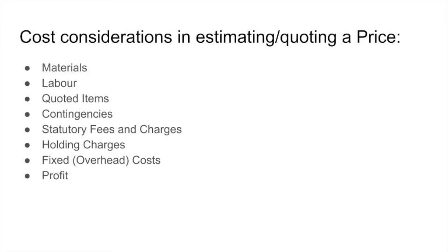The other side of the coin looks at fixed costs. Now you have to consider, what are my fixed costs? So as I say, if you've got ladders, or scaffolds, or all those things that are required in order to do the job you do, those would all be considered fixed costs because you can use those over multiple projects. Every situation will be different, but you have to figure out what costs are variable, the materials, the labor, contingencies, these sorts of things, and what costs are fixed. So it requires sitting down and giving all this a lot of consideration beforehand.